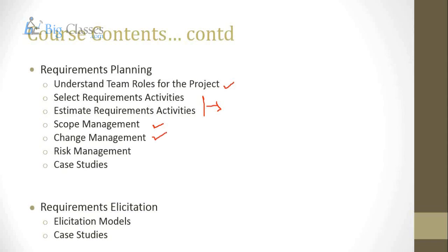You learn how to manage the changes coming in. So you cannot just accept any change which the business team tells you. Why? Because it will have implications on cost and effort as well. Right? Now, having said that, you cannot even refuse any changes, because changes might be required. So how do we get a balance between accepting changes outright and rejecting them outright? How do we manage them? So we need to be aware of the change management process. So we learn that as well. You also need to manage all the risk related to the requirements. So you need to be aware of the risk requirement framework. Okay. So this is what you would learn as part of the requirements planning.